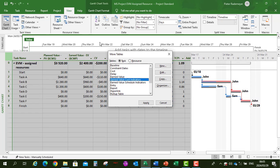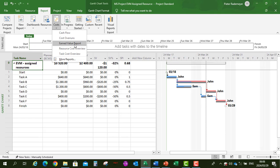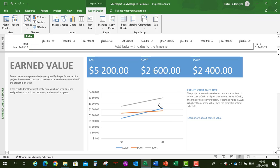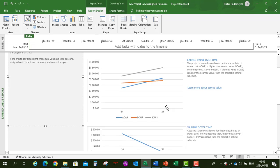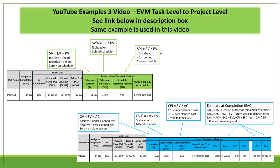Finally, the Earned Value Schedule Indicators table shows Schedule Variance, Schedule Variance percentage, and Schedule Performance Index — indicating the project is 32% behind schedule. You can also create a default earned value report by clicking Report, Cost, Earned Value Report, where you can view and customize the information. The companion Example 3 video, linked in the description, explains all these formulas and their interpretation in detail.